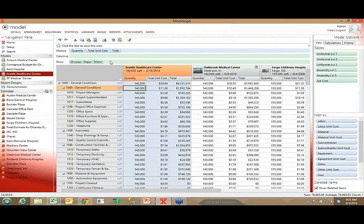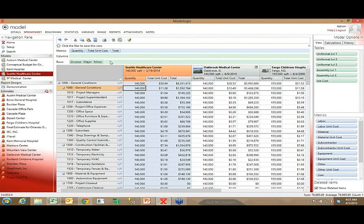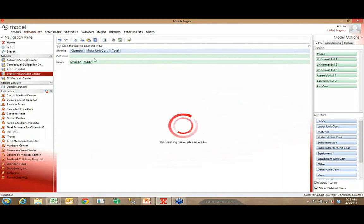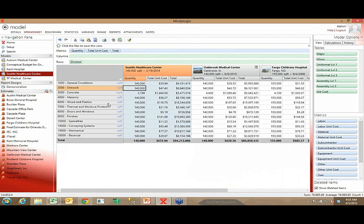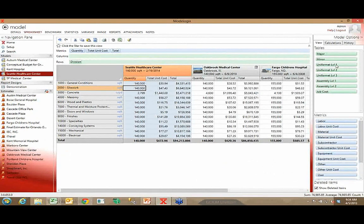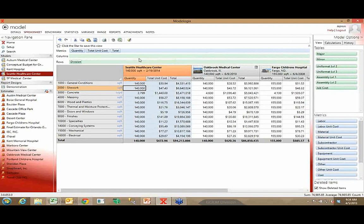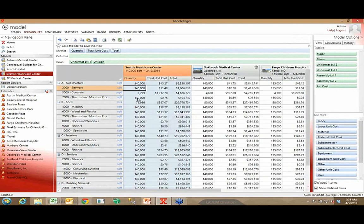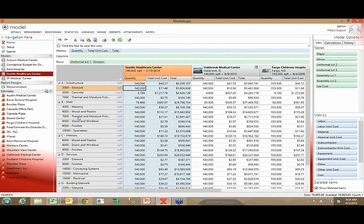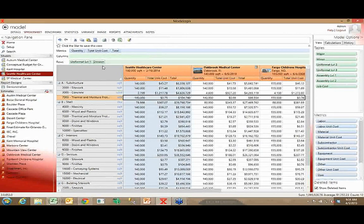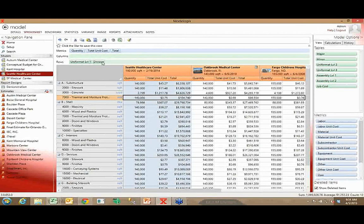Now, something that we just added to the system that most people thought was kind of unimaginable or something you couldn't even do when you're building a model, and that is to actually even use a blend of CSI and Uniformat together. I'll give you an example of how that could work. So let's say that I'm seeing this by CSI code, and I see things like Division 7 thermal and moisture protection, but I also want to see my thermal and moisture protection costs within each system on the project. I could actually take a Uniformat Level 1, drag it over here in front of Division, and drop it, and now you'll notice I can see my costs broken out for substructure, for shell, and you'll notice I've got Division 7 costs in both areas. So you can even mix and match work breakdown structures to allow you to kind of even more intelligently analyze a model.